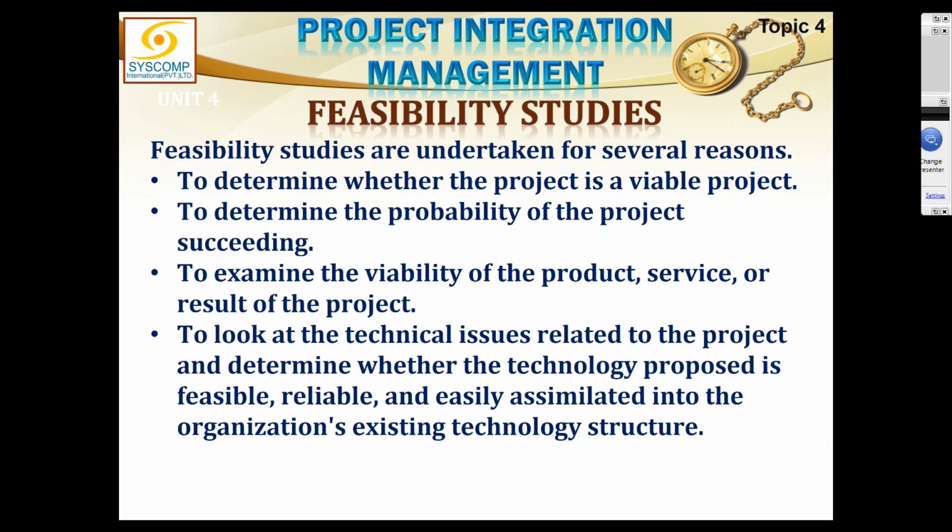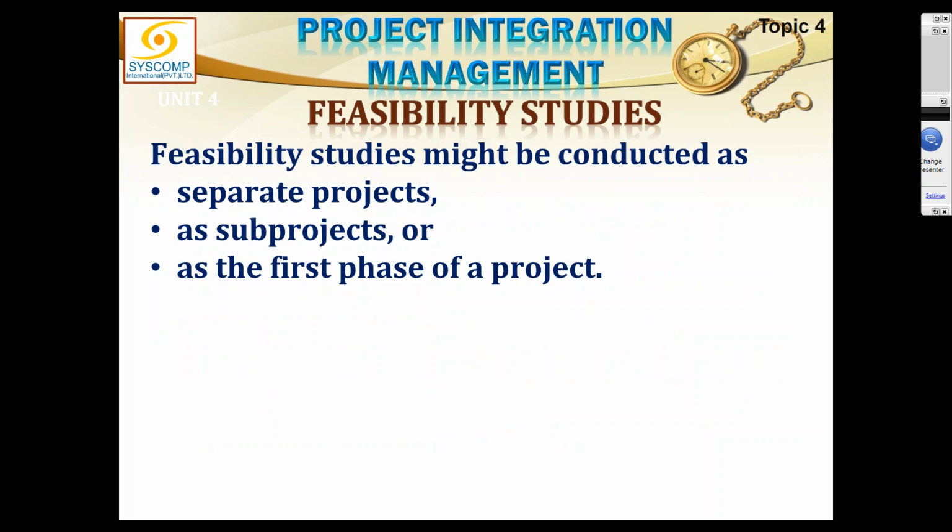You may not have a strategic limitation. You may not have a technical limitation. If you do not have any technical or strategic limitation, then everything boils down to the financial. So financial feasibility would decide whether the project is to be done or not. But if there is a technical priority, we may supersede financial. If there is a strategic priority, we may supersede the technical and financial feasibility. So that was the point I wanted to make here.